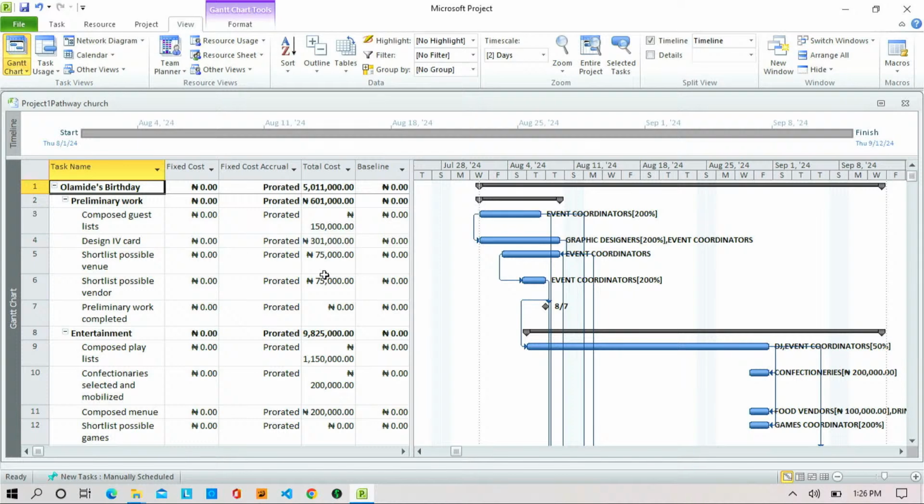Now, the second one is called corrective action. Olamide, you're already working. You're already doing the project. Now, during the course of doing the project, you observe that what you are doing is actually not aligned with your design, with your plan. So right there, within yourself, you say, okay, guys, let's make a change request to correct this anomaly, this mistake. So that correction is called corrective action. You're already in execution. Am I clear, please?